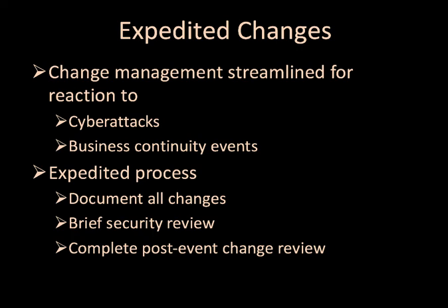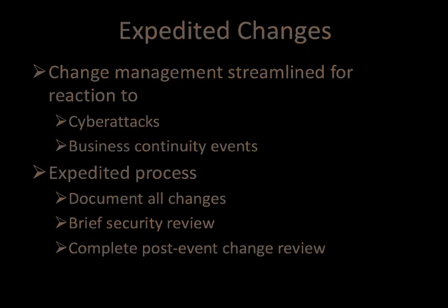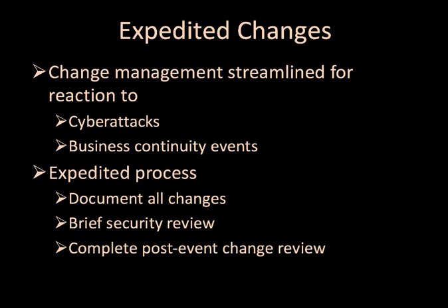So the failure response team submits a scaled-back change request, waits for a quick security approval, makes the necessary change, and restores the business process. When the smoke clears, the change is fully documented, submitted to the change process, and the signatories review it. If something is off, the appropriate teams formulate a plan to correct any risky characteristics of the change.